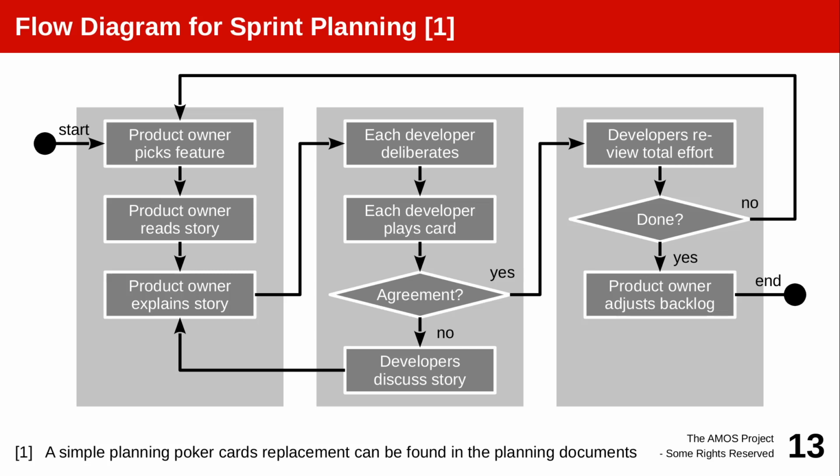In the beginning, it's just gut feeling. Later on, it is, yeah, we usually do 25 story points, we're only at 15, so probably we have more space. And so forth, until the developers say, no, that's enough, that's our fill for the coming sprint, and we close this now. It is the development team's decision how much work they want to do.